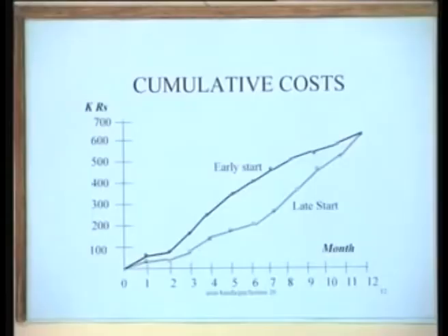So really speaking, the total NPV of expenditure is going to be lower when you are doing a late start schedule as compared to an early start schedule, which means that if you have to raise the capital through an equity loan, or from a loan from a bank, you will have to take a lesser loan if you follow a late start schedule as compared to an early start schedule by virtue of this particular fact, right.